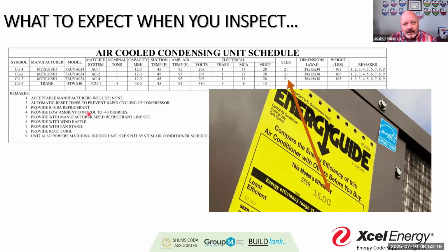The impacts that we've seen coming from some of the different manufacturer changes in refrigerant systems. I've had several projects that have come in saying, hey, we're going to use a 410. And then they get out in the field and the contractor says, hey, we can't get 410 right now. We're going to have to go to a different system, a different refrigerant. It may not be a huge change, but we want to make sure that it doesn't become a huge issue.